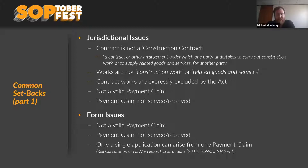There could be works expressly excluded by the Act — those exclusions were narrowed with the 2019 amendments. Another big problem is not having a valid payment claim, particularly one served on the incorrect party — someone who isn't a party to a construction contract, or where there isn't a construction contract between the parties. We also see payment claims not being properly served or received, and people sending multiple payment claims instead of one consolidated claim.